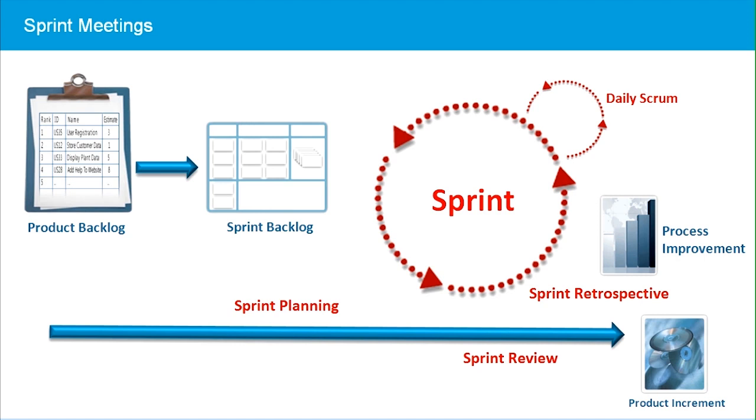Each sprint begins with a sprint planning meeting, where items are moved from the product backlog to the sprint backlog, signaling they will be completed in the upcoming sprint. The product owner maintains the product backlog, with the highest priority items at the top. So the product owner has authority to say what is in the sprint. The Scrum team says how the work will be completed, breaking each item into small tasks with a time estimate. The time estimates are used to determine when the work added to the sprint backlog meets the capacity of the team during the next sprint.